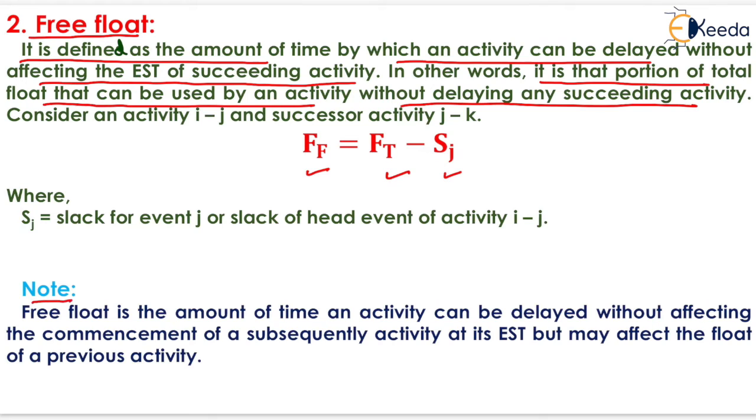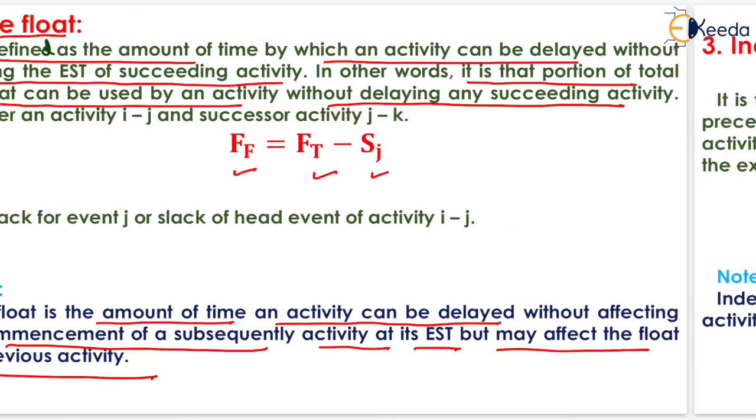Now one note is written here, that free float is the amount of time an activity can be delayed without affecting the commencement of a subsequent activity at its EST, but may affect the float of a previous activity.